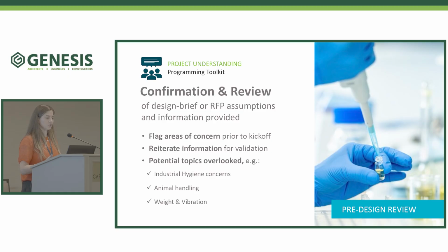But in talking to users at the kickoff, they expressed they were following some BSL-2 protocols with their work that included tissue handling and tissue storage. So flagging that right away for reconfirmation and bringing environmental health and safety into the conversation to align on that was a very important thing to do, so that we're not building the design on a faulty foundation.